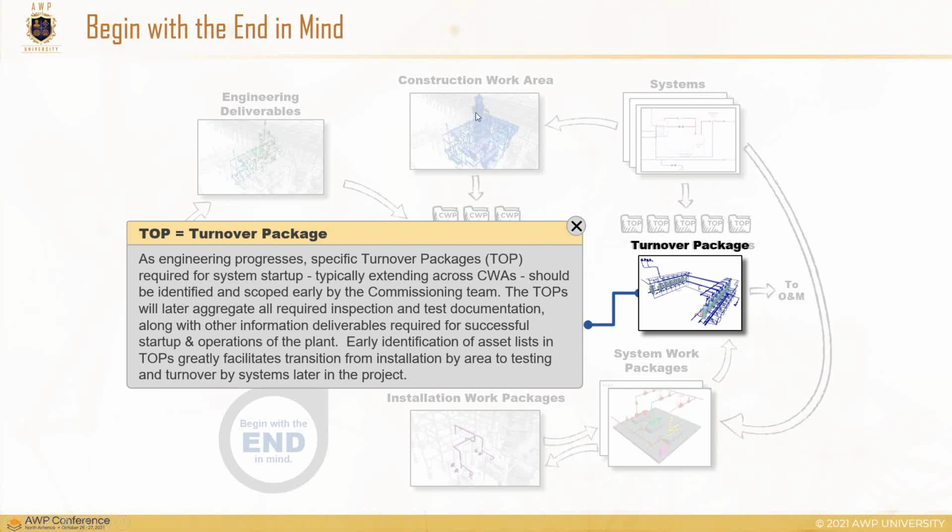We need to operate within that. We've got our engineering deliverables that, based on their deliverable dates, affect the schedule for the CWP. We've also got the procurement requirements that affect the schedule for that level 3 schedule activity that's tied directly to the CWP. So now we've got this CWP that's been heavily constrained and analyzed from multiple different locations. The schedule should make a lot more sense. The level 3 activity node has a lot more credence behind it. The CWP, the contents, the components, and the digital data associated with it are starting to get more fleshed out.